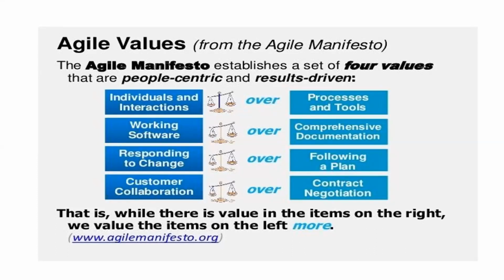In the old method, everybody will sit in a room and read the project report. Your cost is green. Green means you are on target on cost, on target on time. Your risk is looking green. There is a lot of documentation that you have to submit to management to prove that yes, this project is going in the right direction. Why? That kind of documentation is actually needed because the output of that project will not be seen, felt, or interacted with until towards the end.